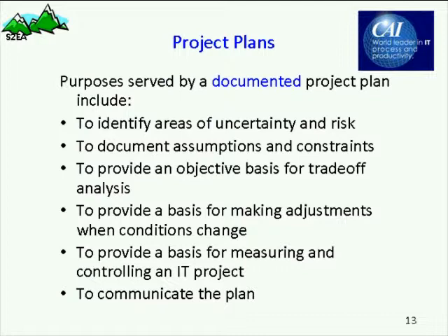So an assumption is something that we assume, we take to be true, that will be true. We'll have the appropriate number of people and the right kind of facilities, and the requirements will be clear. If any of those assumptions are violated, then of course our plan is invalid as well. And it's important to document our assumptions and make them clear to everyone. This is the framework in which I am assuming I will be operating.